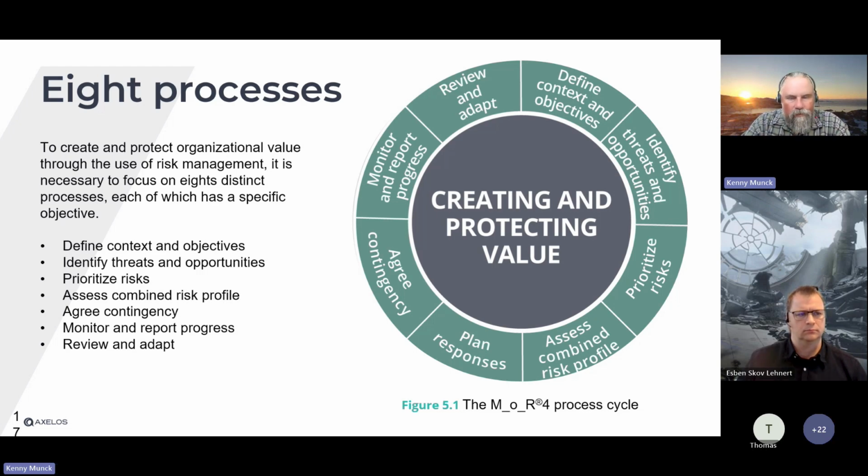The really important part here is that this is not something that you do, for instance, before a phase is starting or before a tranche is starting. This is the mindset that you need to have. So it's a continuously rolling understanding. If you are working in an agile setup, in a Scrum setup, you would incorporate this as part of your sprint start and also the retro, perhaps. So it's a way of working through a certain set of questions. And if you look at it, it's fairly logical.